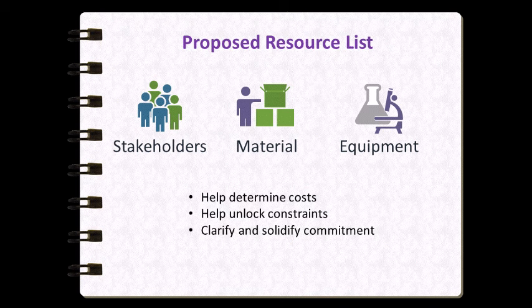The organization has now committed these resources to the project and agrees not to reallocate them during the course of the project. The project manager agrees that with these resources allocated, there is a reasonable chance they can make the project succeed. Once resources have been allocated, the project manager can use that information in helping determine the project's overall cost. They can also be examined to determine whether there are hidden constraints which were not previously known. For example, if a commonly shared lab is only made available for certain times during the month, then it becomes a scheduling constraint that may not have been previously identified.